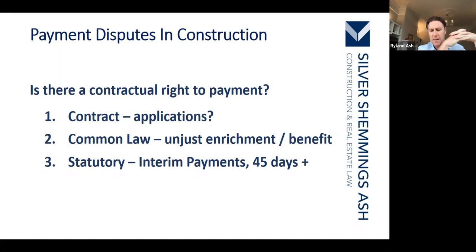If it doesn't state what should be contained within it, then ultimately there's a lot more flexibility available to you when you're making an application. And the application really should just show what you're claiming and the basis of calculation. And we'll come back to those things in a minute, because they're relevant to the validity of an application, equally to the validity of a payment notice and or a Payless notice, as we'll see later when we look at the case law in more detail on this.